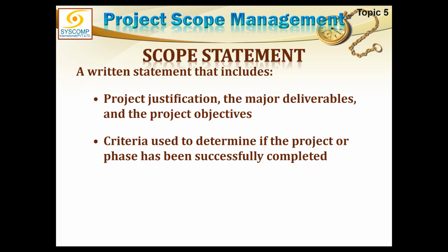No, the project manager has to provide the justification of his own, whether this project can be done, how it can be done, what will be the major deliverables, what are the project objectives, and generally he will divide it into the project phases and will show confidence in this document how he would like to do it. So this is a commitment from the project manager's point of view. Otherwise, I have also mentioned that the product and project scope is established here. The different approaches to do the project are established here,